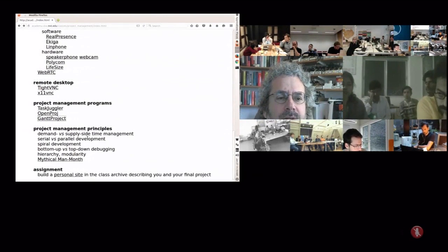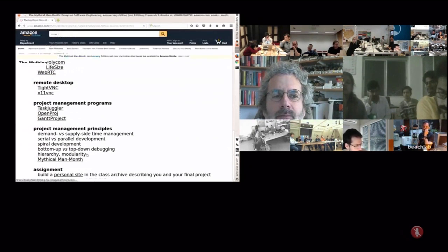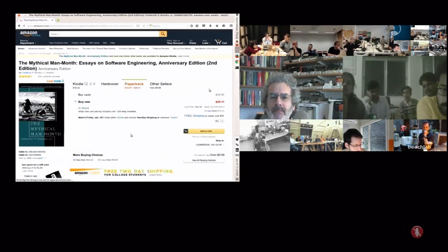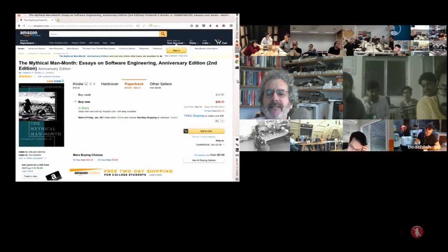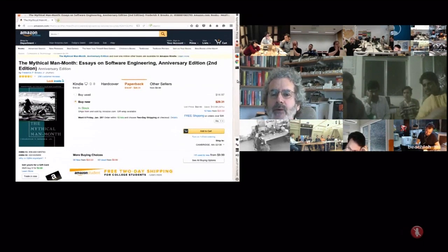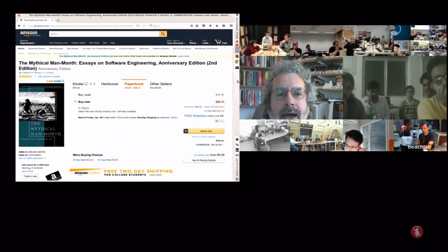This is a really good book I recommend called The Mythical Man-Month, written by the person who ran IBM's 360 project that almost killed IBM. And it's full of insights like a pregnancy takes 9 months no matter how many women you assign to the task. These really interesting observations about how to think about managing a project as a skill.